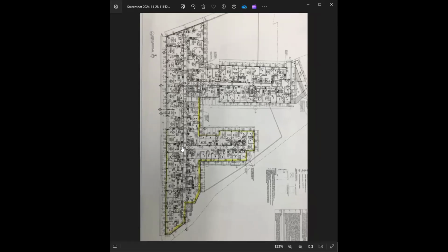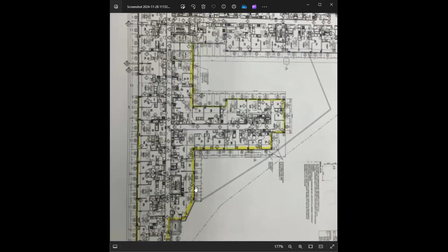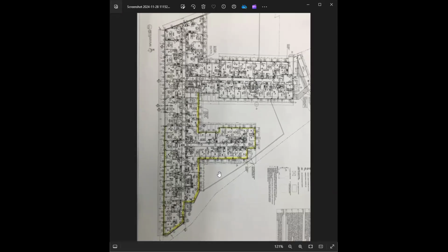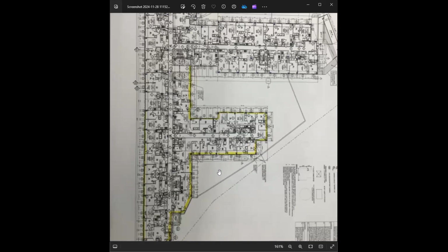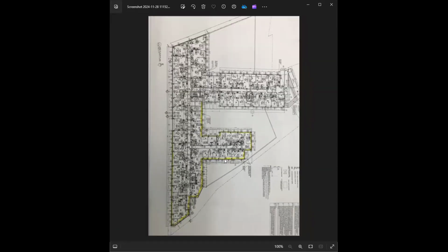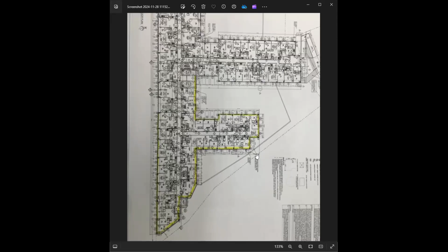Some of the walls are still under construction or they haven't started yet. So make sure that you have written down all the floors, because sometimes they only do installation on certain floors, and some of the floors are already done. As for the drawing plan, you can only mark the top view of the inspection that you did.